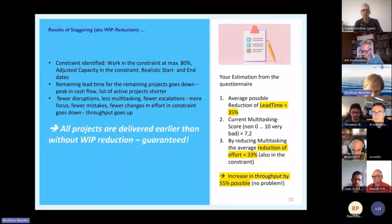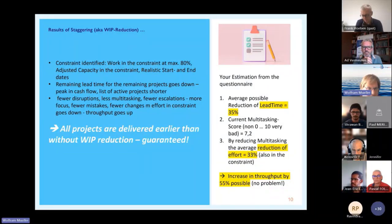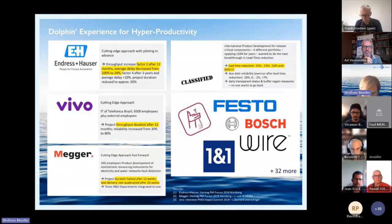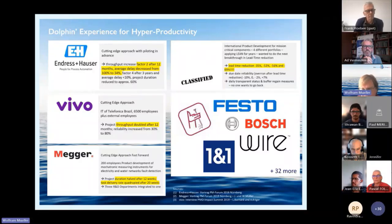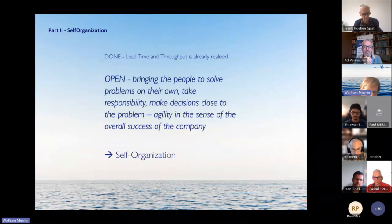The only assumption is that the constraint is within your organization. Doing these first four steps will lead to shorter lead time and more throughput reliably. It's not very hard and it does not take long — the only thing you have to do is staggering and stop the non-priority work.